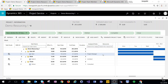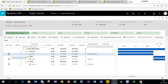First, on the work breakdown structure, we can see that we have a task set up. We're going to focus on task 1.1 called 'Start' and we're checking the task mode. The task mode has been set to automatically scheduled. Dynamics 365 Project Service Automation has two task modes: automatically scheduled and manually scheduled.